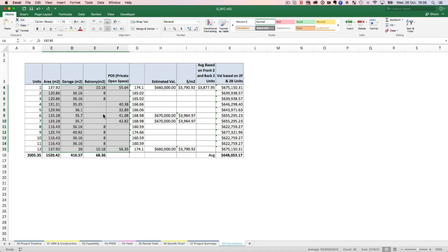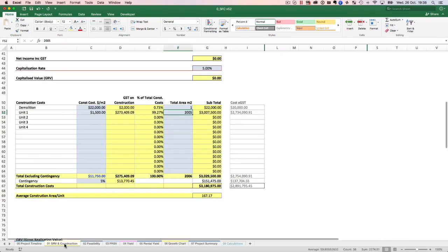Now, if I haven't got any plans and permit, I have to just go by the size of the townhouse that I'm going to put in. Because I do this all the time, I know that if I'm going to build a 2-bedroom, 2-bathroom townhouse, it'll be about 130 square meters. And if I start building a 3-bedroom, 2-bathroom, double garage townhouse, it will be approximately 168 square meters, or 18 squares, or 20 squares and so on. So that's how you get this number.